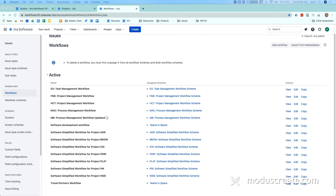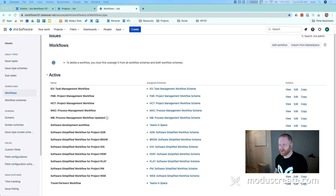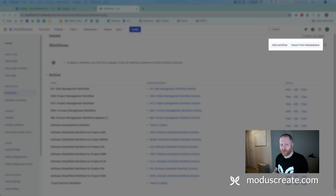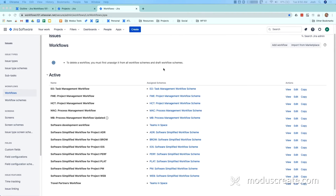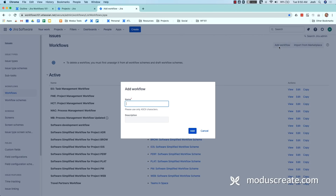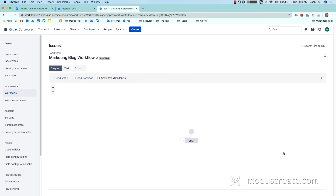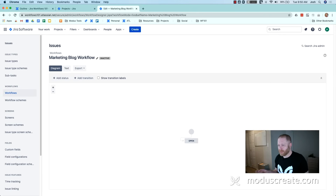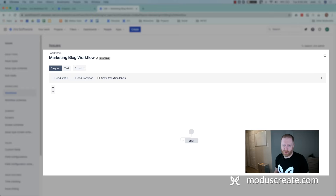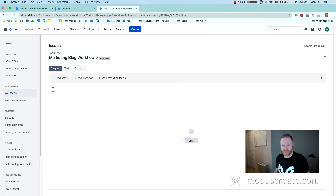So here we're looking at the administrative view of all the active workflows in the system. To create a new workflow, you can see in the top right we have two options: add a workflow or import it from the marketplace. For our purposes today we'll start a new workflow from scratch. The workflow we're going to build is for a marketing team to track blogs from idea to published. Now we're presented with the workflow designer. Across the top are some buttons, and in the middle we have a workflow with the bare minimum requirements — one transition and one status. The circle represents the initiating event of the process, which is when a user completes the create form and clicks submit. When an issue is created it goes into open and doesn't have any more options, so let's start creating some customization.